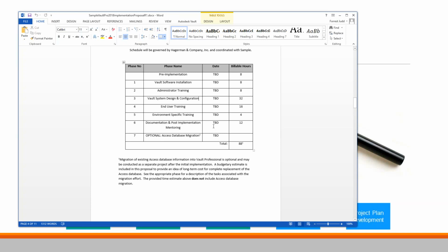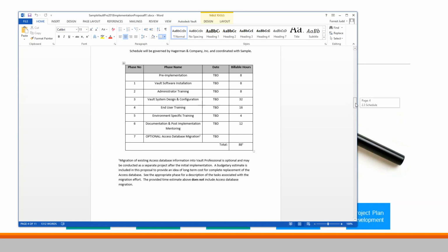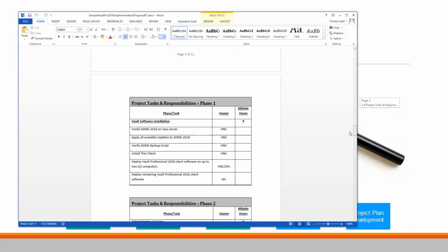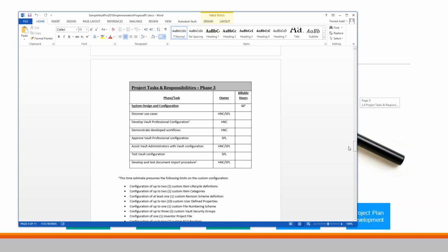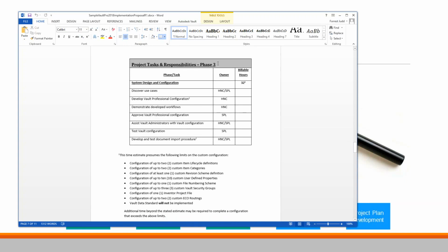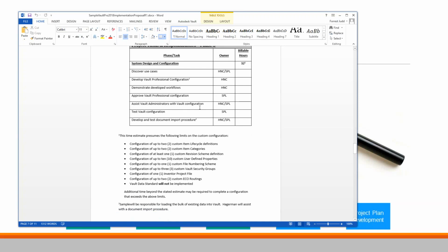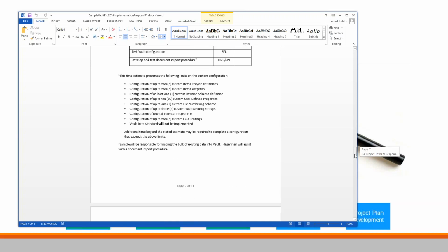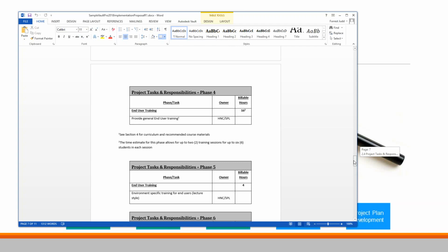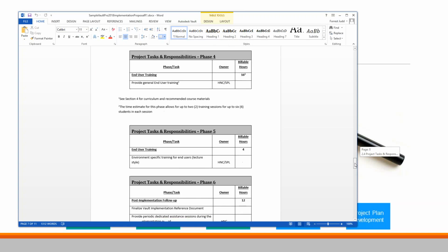if there are special considerations like migrating data from a legacy system, we try to provide our best estimates for those as well. Those can be a little bit tricky to do in a purely pre-sales capacity, but we at least try to give a budgetary estimate. And then the proposal will commonly break down, on a phase-by-phase basis, what tasks we would execute. The goal here is to, if nothing else, assist you with an ROI determination, okay?